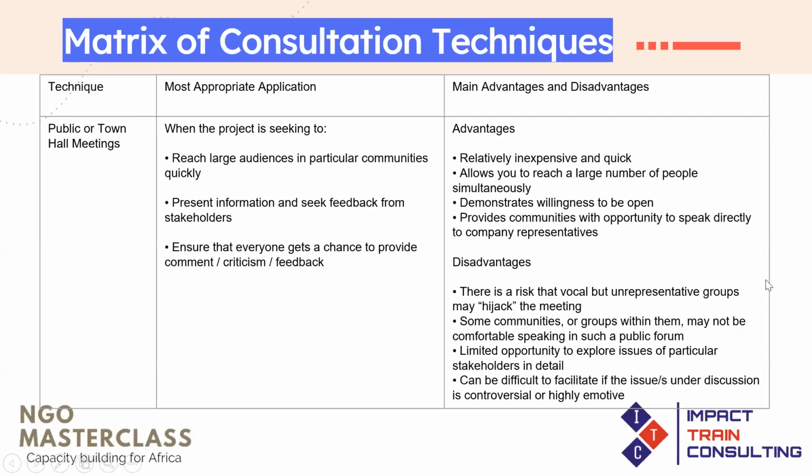We also have public or town hall meetings. So you carry out a town hall meeting when you're trying to reach a large audience in particular communities quickly, when you're trying to present information and seek feedback from stakeholders, when you're trying to ensure that everyone gets a chance to provide comments, observations, or criticisms.